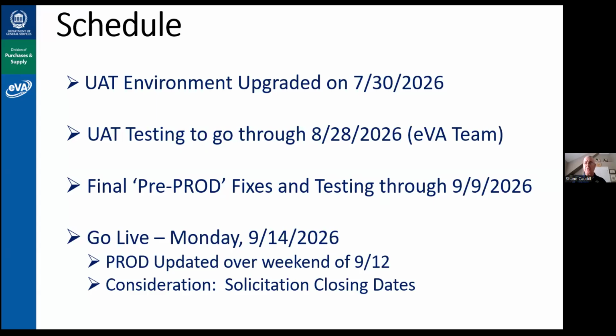We have a couple other groups doing some testing, but the goal for our particular team is to finish our planned testing, the functional areas we have planned to look at. We're looking to wrap that up this Friday. And then up through September 9th, we're going to do pre-prod fixes and some additional testing just to get the environment ready and wrap up any issues we identified. That at least is the plan right now.